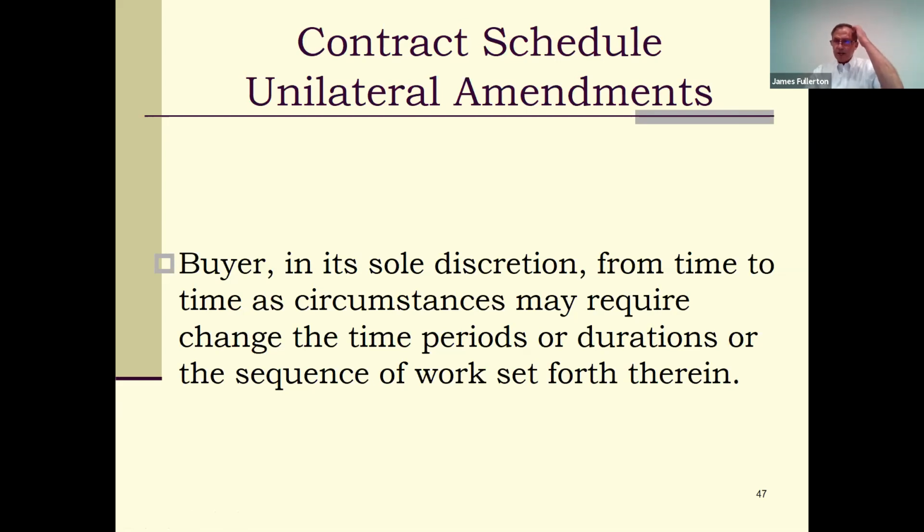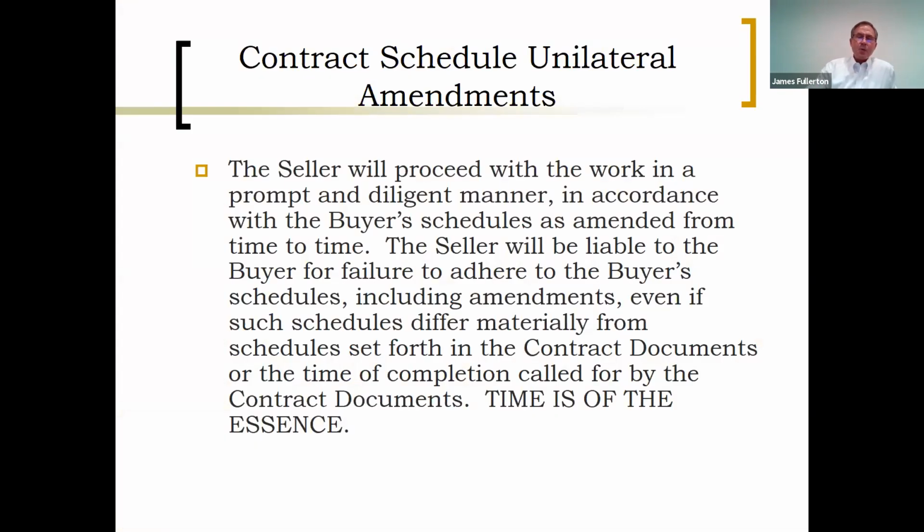It's like the difference between a unilateral attorney's fee provision and a bilateral one. It's like not having notice and an opportunity to cure. It's like not having a force majeure clause. You cannot agree to this. How do you change it? Make effective changes with as few words as possible that you can get people to agree to. You use the word reasonable, and you use the words by mutual agreement.